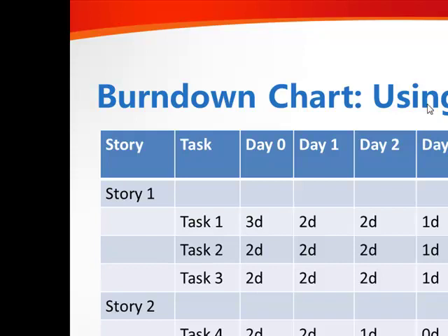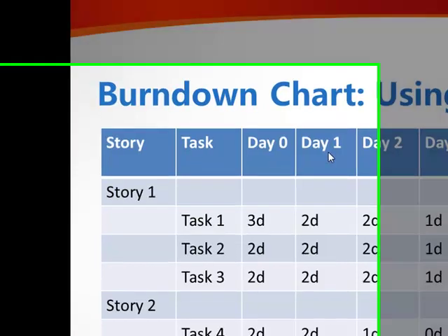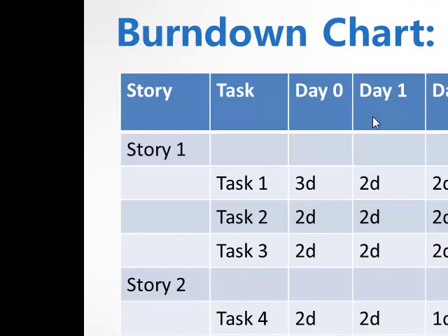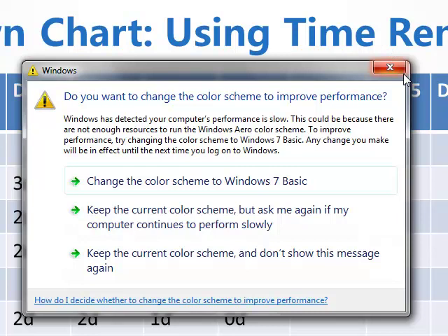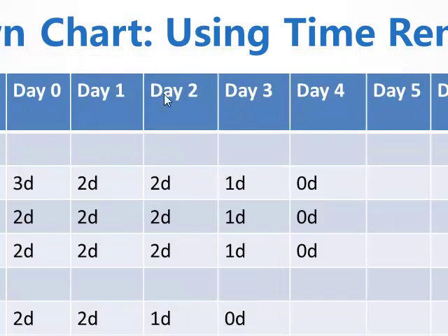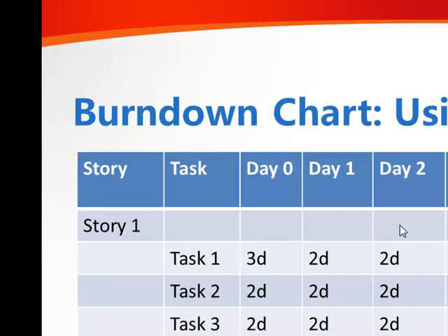Okay. When 1 day passes, we should from this total be able to subtract 1 day. Okay. In which case, on day 1, that is correct. We have 2, 2, a total of 6 days remaining. On day 2, however, we encounter an anomaly. Day 1 and day 2 seems like there was no change done. So we still have 6 days remaining.